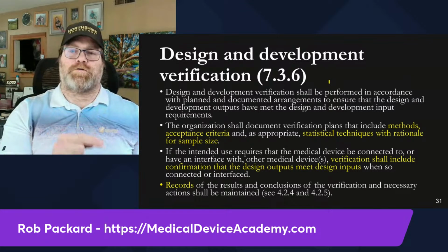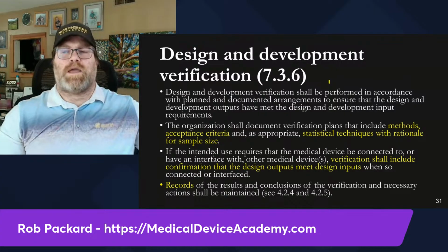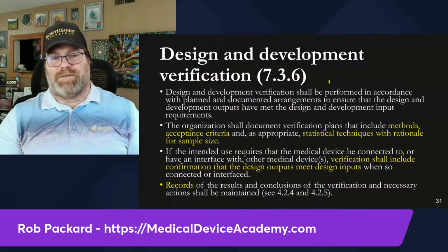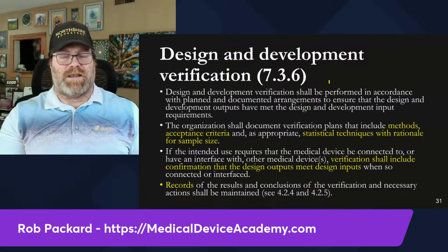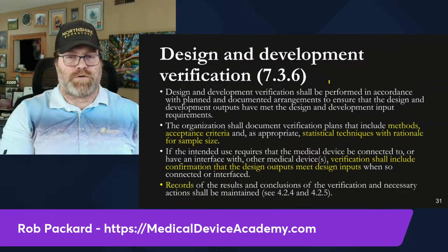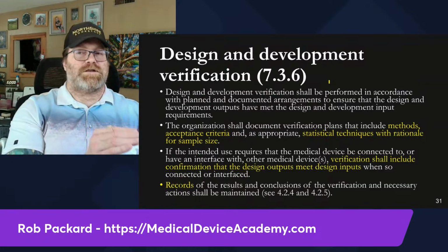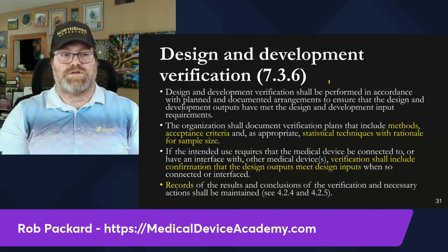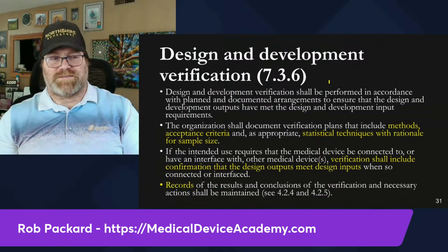And you want to have that person working on the protocols for your pre-sub, which is way, way back at the beginning of the development phase, after inputs have been approved, but before you finalize your design. That's when you're writing those protocols. So regardless of what the final design looks like, it's still got to go through the same protocol. So the protocol needs early development before the device is done.